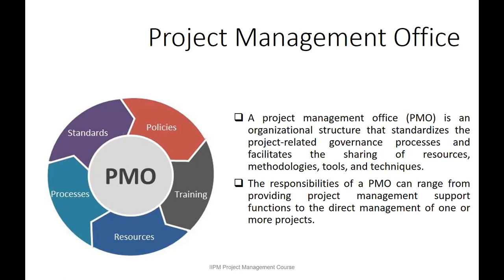Now, a project management office is an organizational structure that standardizes the project-related governance processes and facilitates the sharing of resources, methodologies, tools, and techniques. So they are like the approval department for whatever happens within the project. They have to check whether what you are requesting versus what the governance structure is saying is true. If it is right, they approve. If it is not, they will call your attention back to what the standard is saying. The responsibility of a PMO can range from providing project management support functions to the direct management of one or more projects.